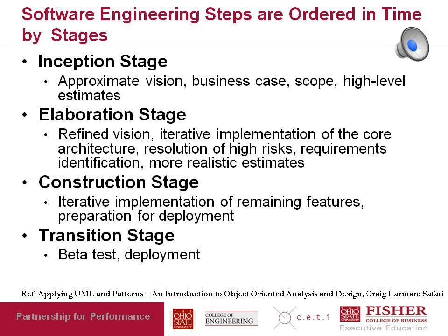And then finally, the project will have a transition stage where the software will be turned over to the customers to use. Now, even these stages won't simply happen once for each project. You can think of these phases as happening once for, say, every iteration or once for every release. So the project will cycle through these stages many times during the course of the project.